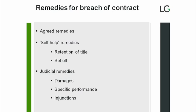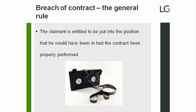Equitable remedies such as specific performance or injunction are discretionary and will not be available if monetary damages would provide an adequate remedy. The general rule is that where a contract has been breached and the claimant has suffered loss, the claimant is entitled to be put into the position they would have been in had the contract been properly performed. What we are talking about is net loss to the claimant, after benefits arising from the breach have been taken into account.